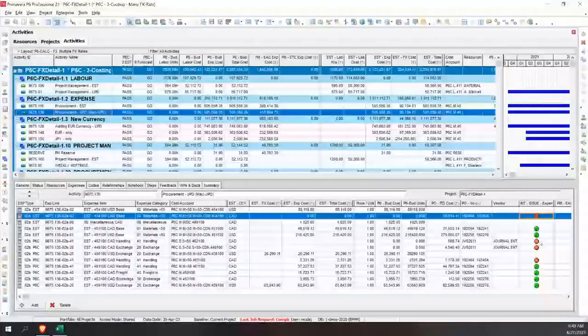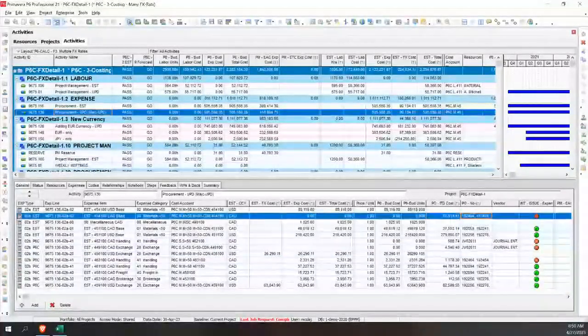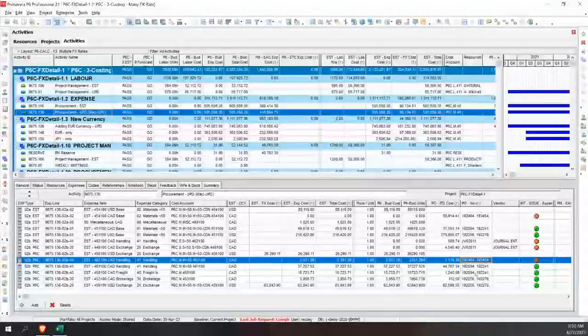It wasn't part of the plan. So in this case, in the integration, we grabbed their journal entries. And of course, we need those in the system to be part of the calculations. Those are important components when you're looking at integrations. Now in this example, you can see we're carrying PO numbers, so they can go check those. So with an integration or an upload, there's other layers that you can put in here, which are really important.